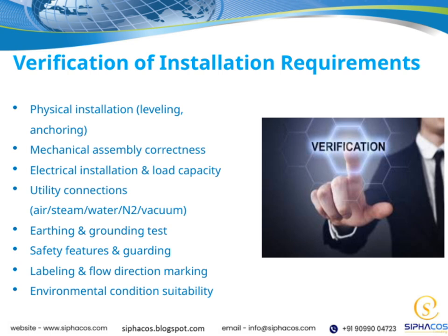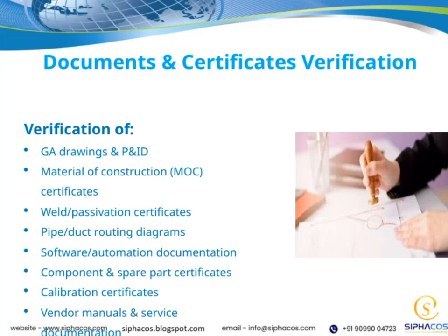Environmental conditions matter too. It's important to confirm the installation environment matches the specified conditions, whether temperature, humidity, or cleanliness standards. Lastly, we should always verify that the installation meets all the predefined requirements, ensuring everything is compliant and ready for operation. All these steps, when done thoroughly, help us achieve a safe, reliable, and efficient system that aligns with the overall project goals. Let's now discuss the verification process, which is a crucial step in ensuring project quality and compliance.